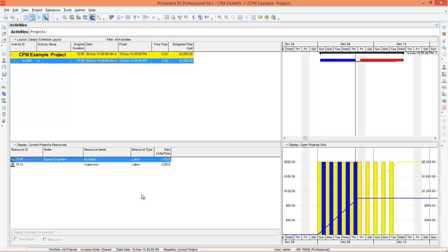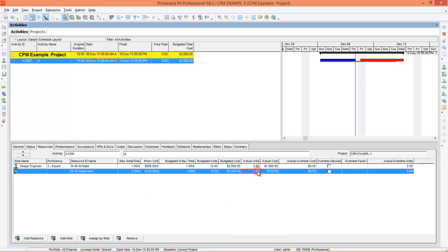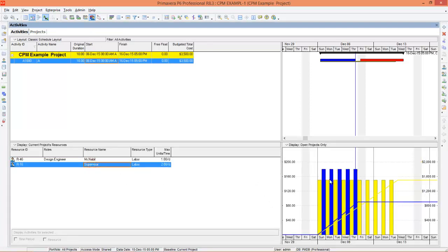If you want to enter actual values of the two resources, go back to Details and go to Resources. Actual units is 5 — let's make it 6. You can see the cost has also changed to $900. Now go to Resource Usage Profile and go to Supervisor. You can see a change in the actual versus what you planned. That is why in the curve you can also see a variance — there is a blue curve and a yellow curve.